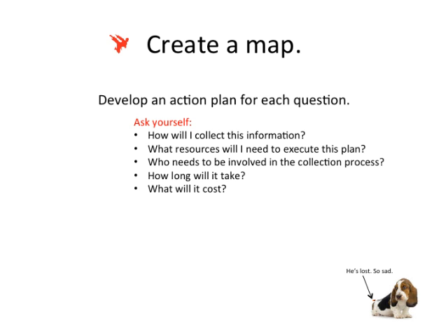If I don't know how long it's going to take, I can't build it into my overall project plan with adequate time, and I may not have the research completed in time for my final project deliverable. And finally, if there's any costs involved, I need to know ahead of time in order to plan. So don't get caught in a hairy spot. Ask the right questions, make a plan before you try to execute.